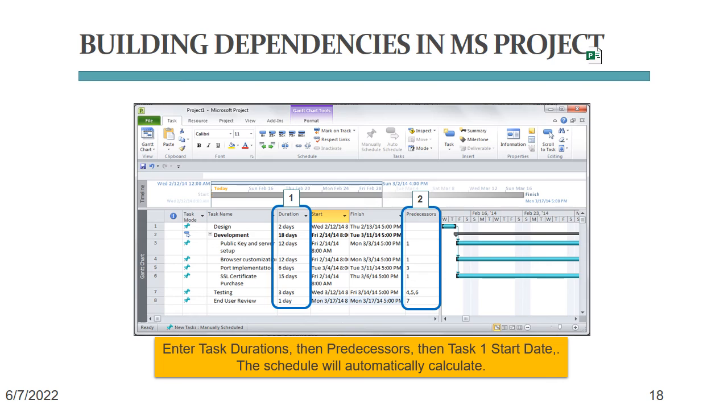The next thing we need for our network diagram is the predecessors. Remember our 10-task project from earlier and how we saw that tasks C, D, and E followed B? As you can see in this Microsoft Project screen, the layout is really almost identical, only that here the predecessors are filled in based on the line number. So now is a good time to pause this video again and enter the predecessors for the tasks in your work breakdown structure.